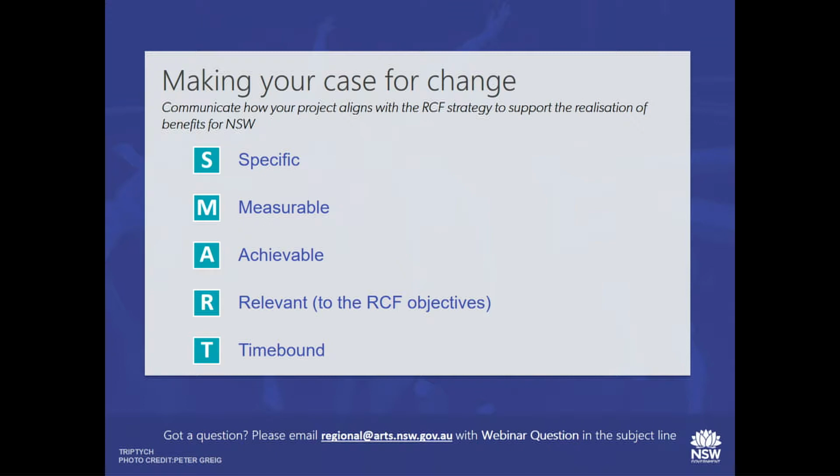For example, if the goal is to build more gallery space, the objective might be to provide your community with a space to display the work of local artists and raise their profile. The success criteria you use here might be that a certain number of people attend, a certain number of local artists are involved, or revenue increased due to the project.